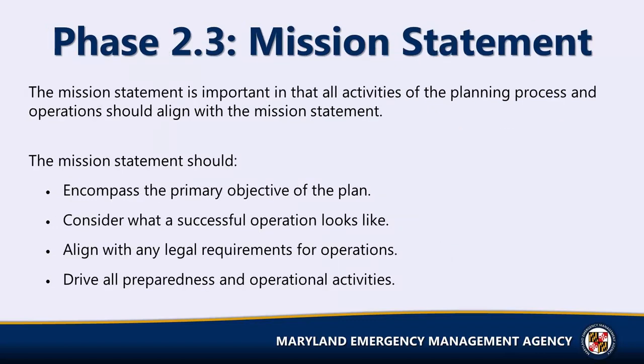The mission statement is important in that all activities of the planning process and operations should align with the mission statement. The mission statement should encompass the primary objective of the plan, consider what a successful operation looks like, align with any legal requirements for operations, and drive all preparedness and operational activities.